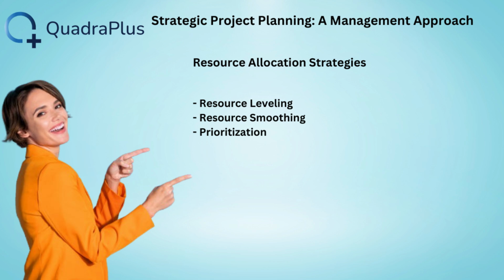2. Resource smoothing. Optimizing resource allocation without affecting the critical path. Unlike resource leveling, resource smoothing ensures that critical tasks are not delayed. It adjusts non-critical tasks so that resource utilization is balanced while staying within the project timeline.